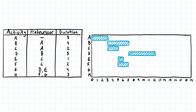Activity G depends on both D and E, so it can't start until both D and E are finished. G is four days long. Activity D ends at the end of the twelfth day, and activity E ends at the end of the sixth day. Since both have to be done, we clearly have to start after the end of the twelfth day. That's where activity G will start, and it's four days: one, two, three, four.